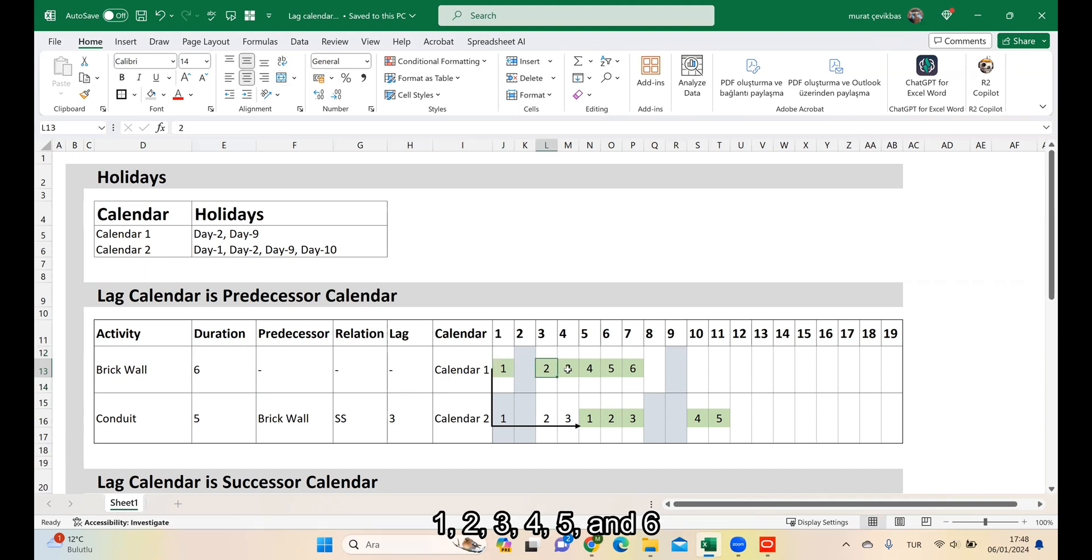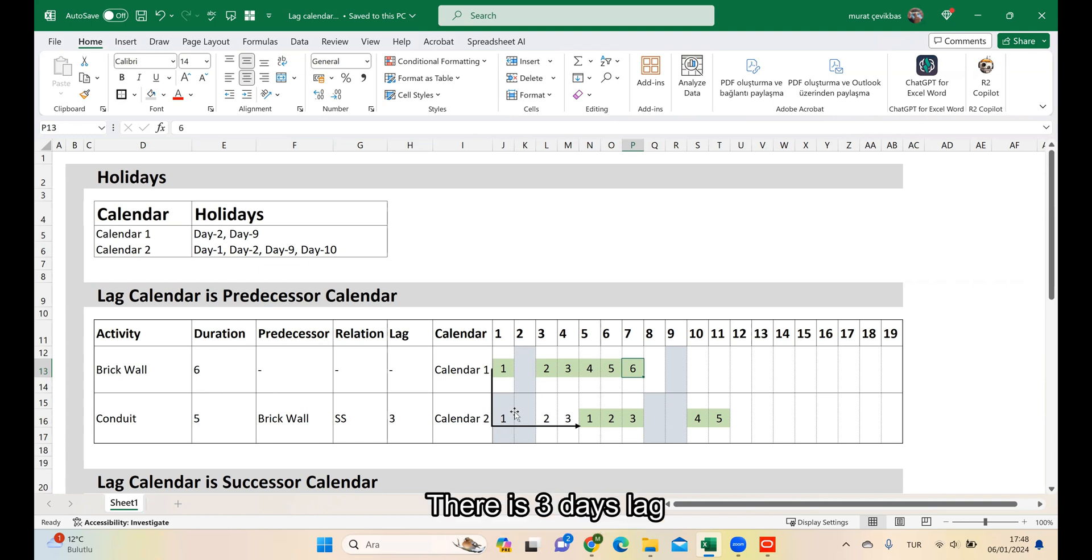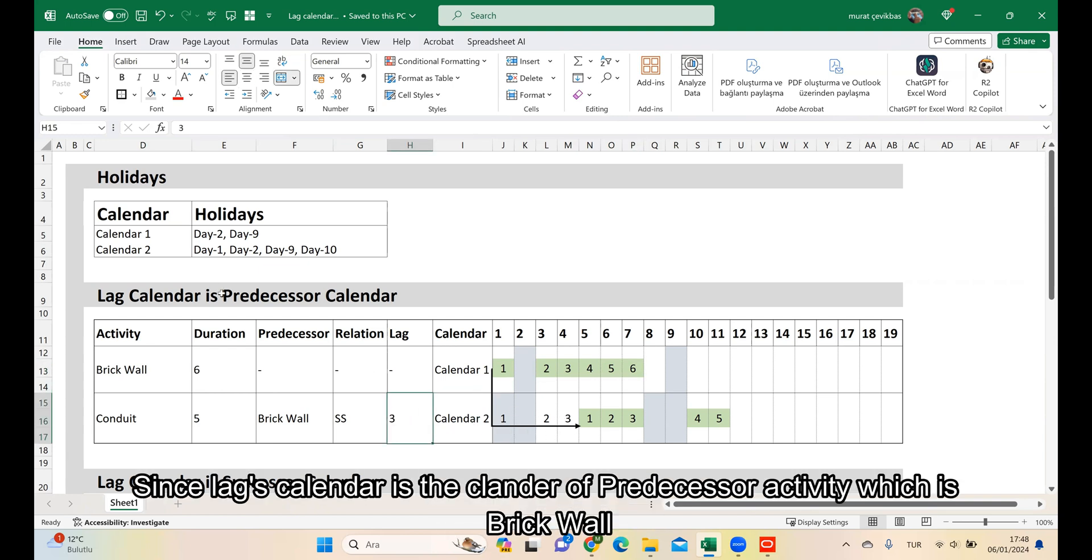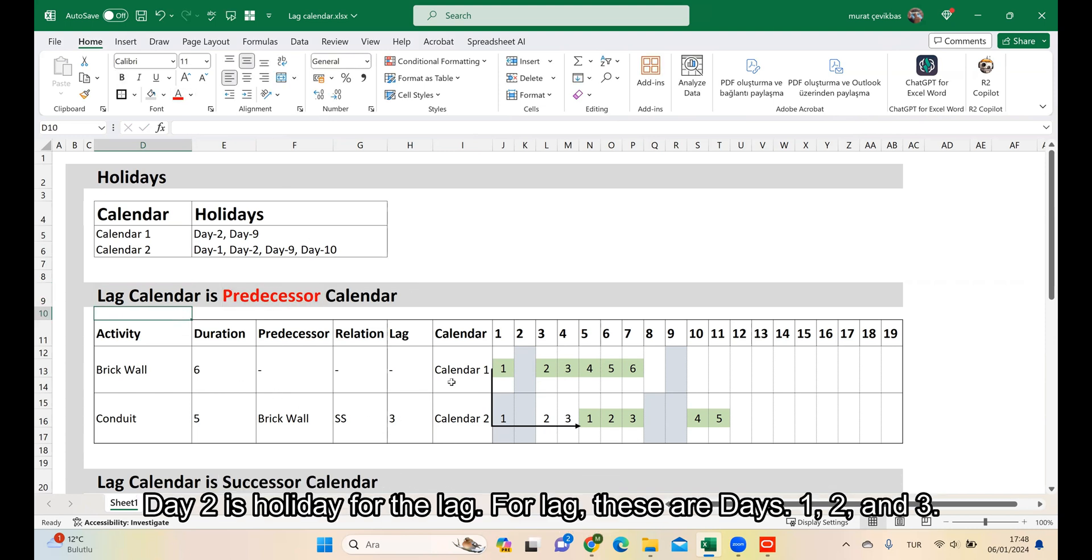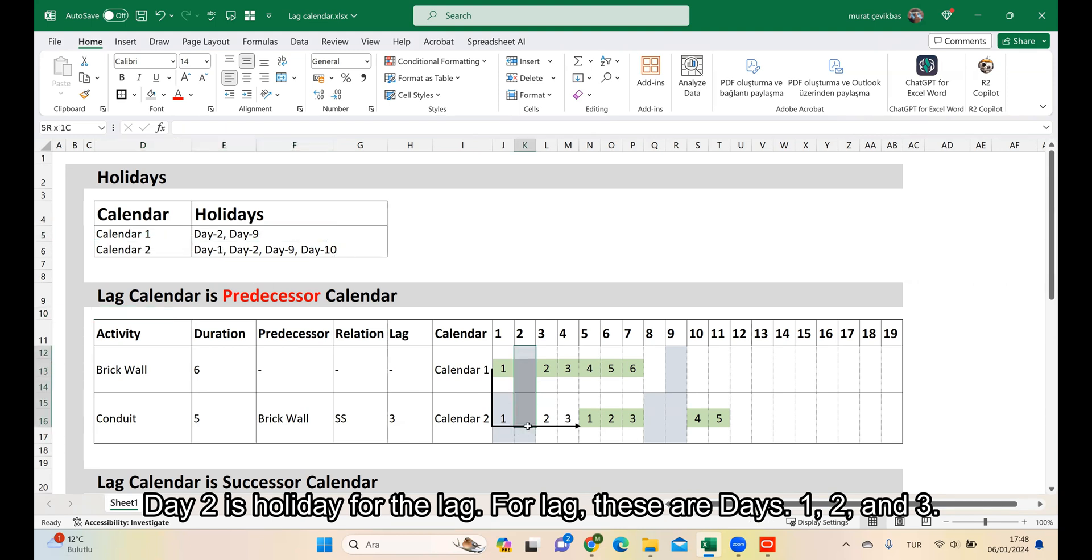Days 1, 2, 3, 4, 5 and 6. There is a 3 day lag. Since the lag's calendar is the calendar of the Predecessor activity which is Recall, day 2 is a holiday for the lag. For the lag, these are days 1, 2 and 3.